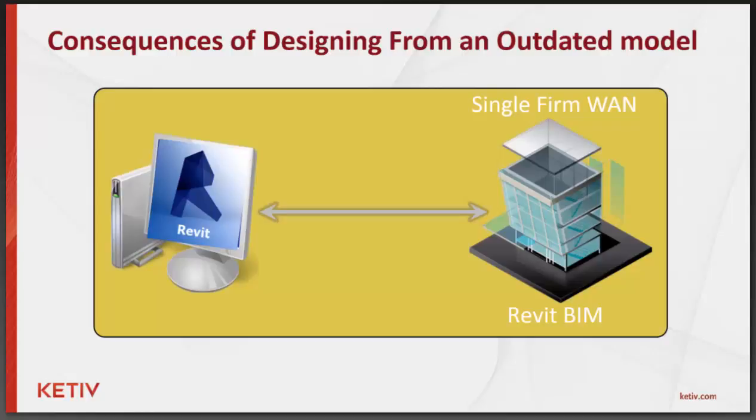So when it came time to upload our current models, the architect would link their most current model to ours. Then they would use Navisworks to detect the clashes and then send us a huge item list of things to fix. This process was a never-ending collaboration headache for the architect and for my MEP project team. The time it took for us to fix these clashes truly impacted our project budget and took valuable time away from me working and designing on other projects.